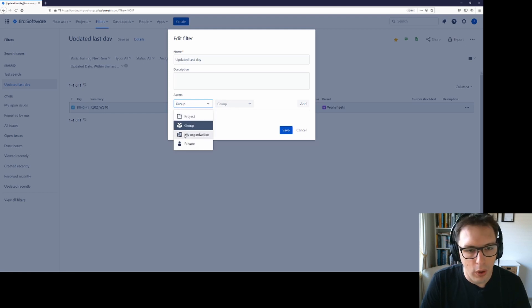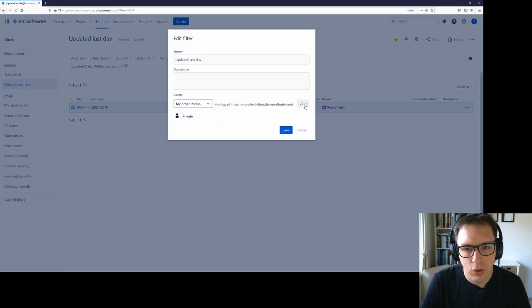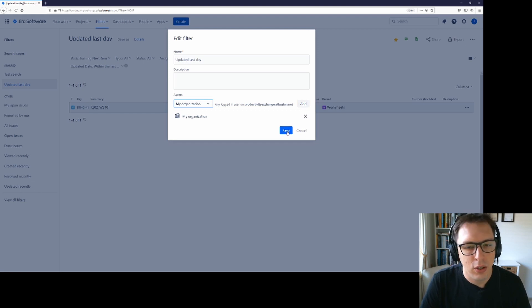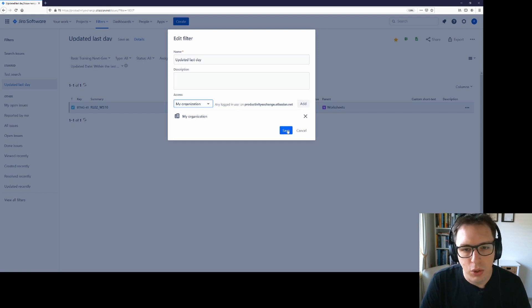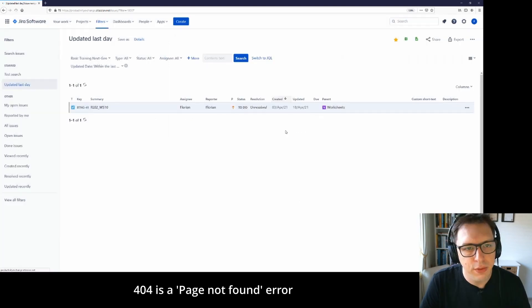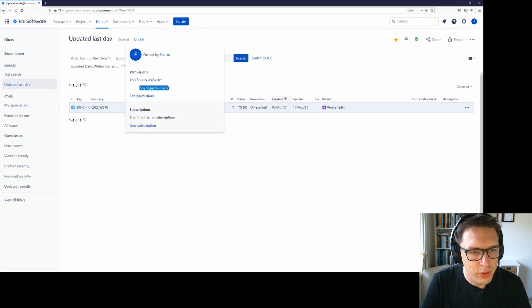Just remember to hit add before you hit save because if you do not click add, it doesn't update here. And if you then try and share it with somebody, they will just get a 404. So I'll hit save and I've updated it so I can now see that any logged in user is visible.